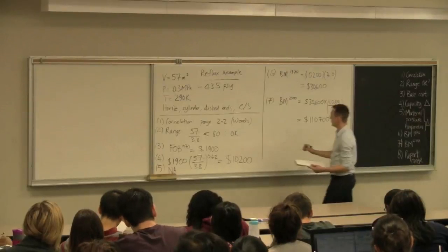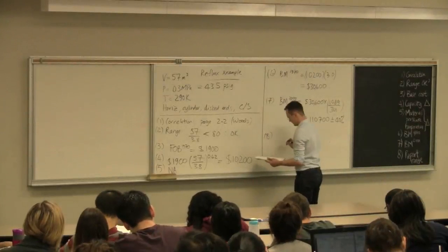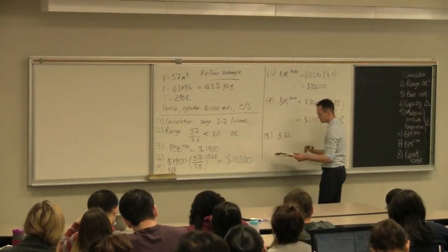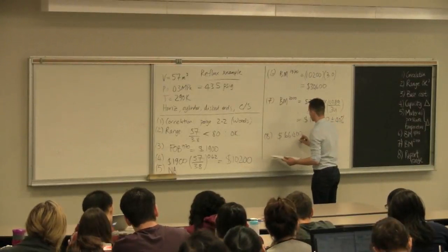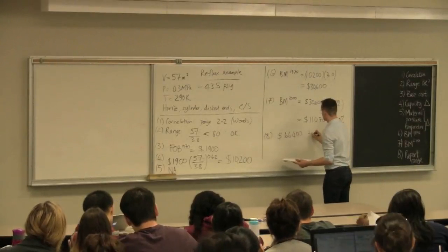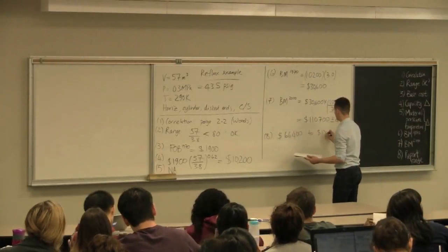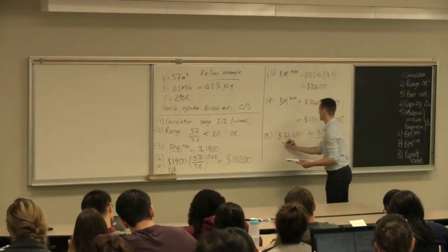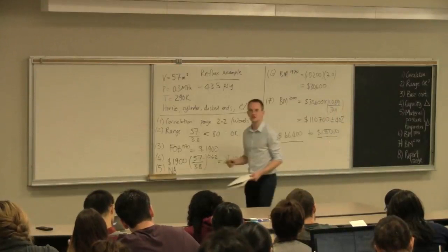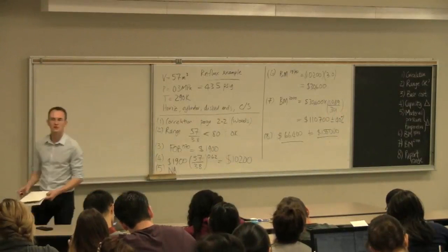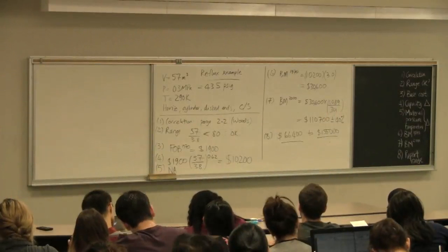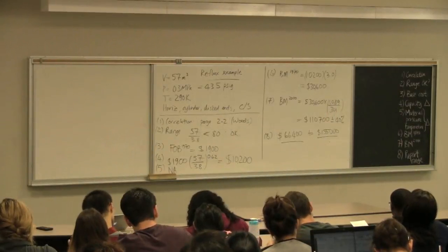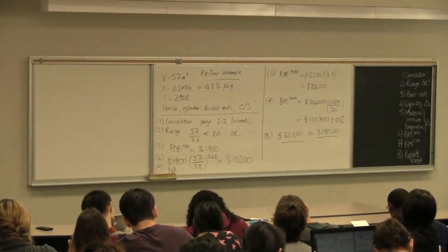If we report those ranges, then depending on the supplier we choose and our relationship with the supplier, that would be somewhere between 66,000 to 155,000 installed. So delivered, installed, piping up to the rest of the distillation column, some control systems and instrumentation around that, all added into that box.